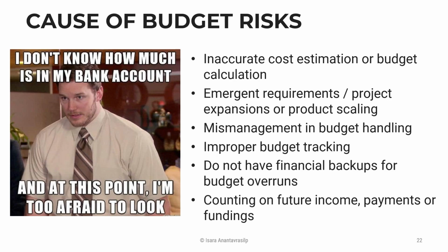It could also be caused by simple mismanagement, right? Using money incorrectly, poorly managed cash flow, for instance, and improper budget tracking. So when you are spending on your project, whether it is for software, for development costs, or for other expenses, you didn't keep track of them well enough, and before you knew it, you were running out of cash.